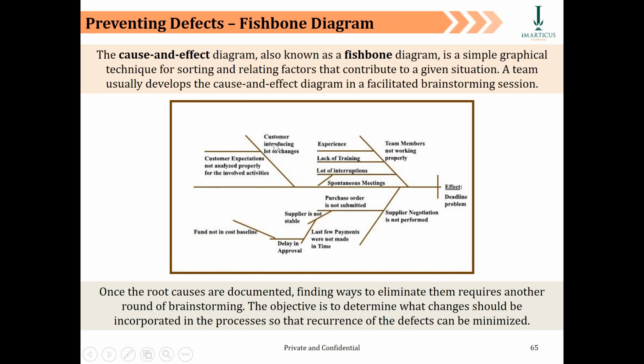What does it say? We are analyzing, and actually we created a fishbone diagram for defect management. So we said, hey, let's do a cause and effect. What is causing this error, and along with that let's attach what are the effects of the same. So let's say this is a simpler one where we say, okay, what the problem is, guys, is that we are not able to meet the schedule of the project.